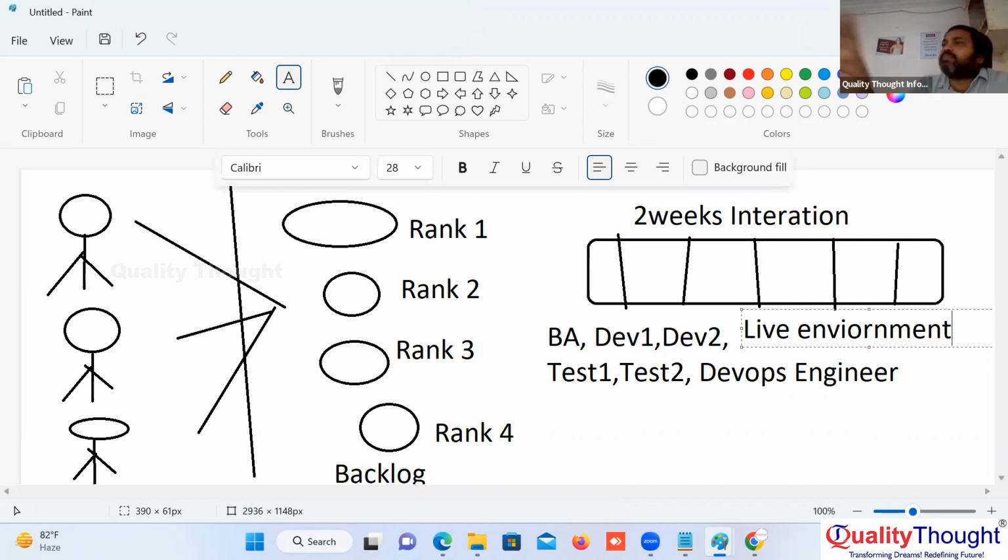Sir, they have not built the entire project. They built a product with minimum features. We call it MVP, minimally viable product. So we have not built all 30 floors of the building. We built one ground floor flat. One flat out of 300 flats, we built one flat, but that flat with minimum features means that flat is ready with interior, water supply, power supply, minimum features are ready. So one minimally viable application, minimally viable software, minimally viable product is ready.